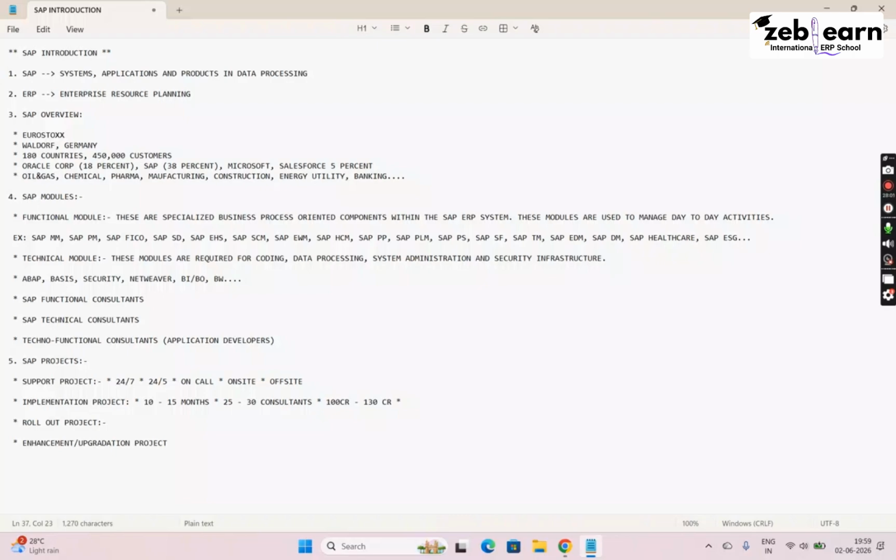So they will ask them to implement SAP in that one location and they will use the software for some time, at least for a year. And by then they will come to know whether it is really good, whether they are getting any benefit out of SAP or not. They will have a good idea by the end of 1 year. So if they are happy, then they'll say, fine boss, we are happy with the SAP solution. Do one thing, implement the same solution across other locations also.